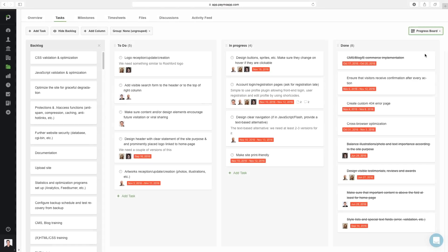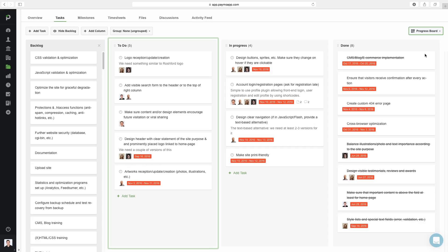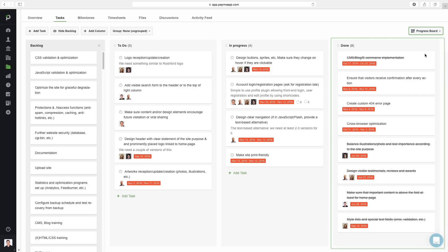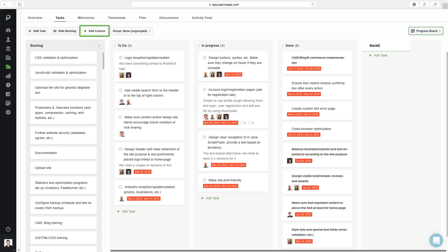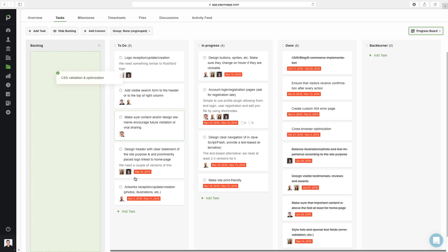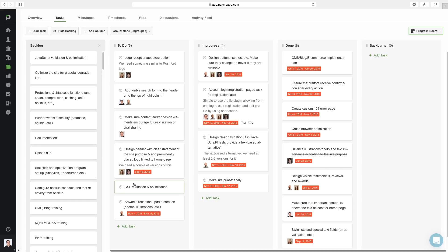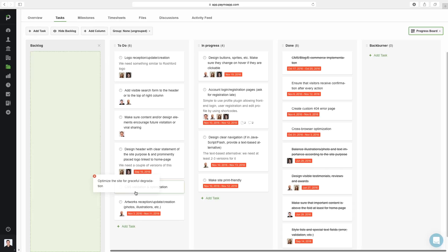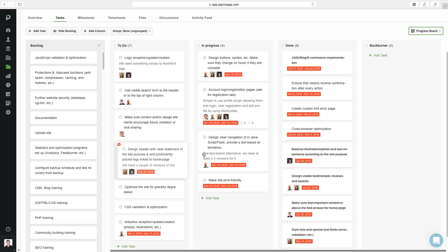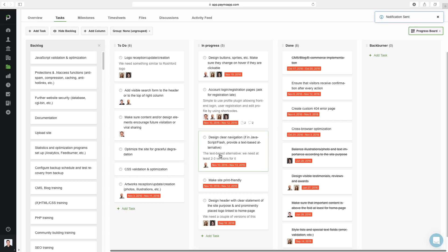The progress board, or Kanban view, is really useful for managing workflows as tasks go through different stages. The most basic ones are the preset to do, in progress, and done columns, but you can also add your own custom columns. To move tasks between different stages, simply drag them from one column to the other. In a separate tutorial, we'll cover this view in much greater detail.